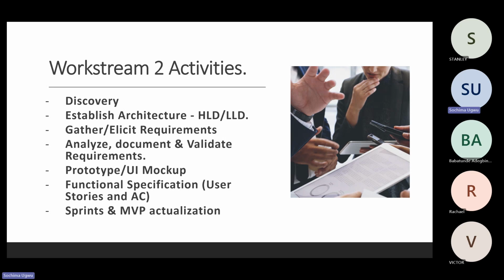So at the point when I have put that in either Word format or Excel format, it is now time for me to approach the stakeholders with whom we reached that agreement, or who provided those requirements. They are usually people of power, to be honest. But there's usually a meeting which would have both lower staff, who essentially have provided requirements, as well as the high level staff, maybe your project sponsor and so on. And these requirements will have to be validated. So validation essentially means a sign off.